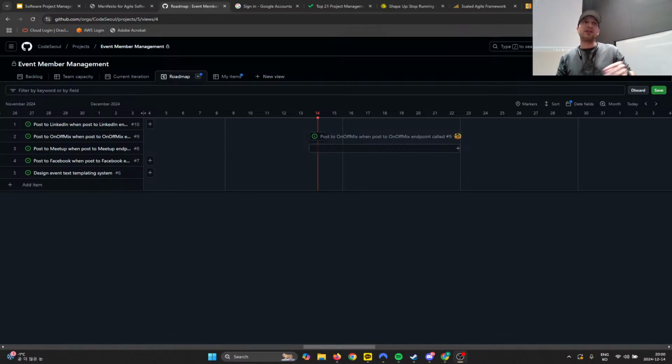If we were like, oh, this is 16 points, he'd be like, no. It would be like, no, it's 16 points worth of effort. It's like, no, I get that, but you're not putting a 16-point task in the sprint. You're going to break it down into smaller pieces. Well, it's really 16 points. It's like, no, think about it. I don't know what the hell it is, but think about it. There's a way you can break it down more. That's a good PM.